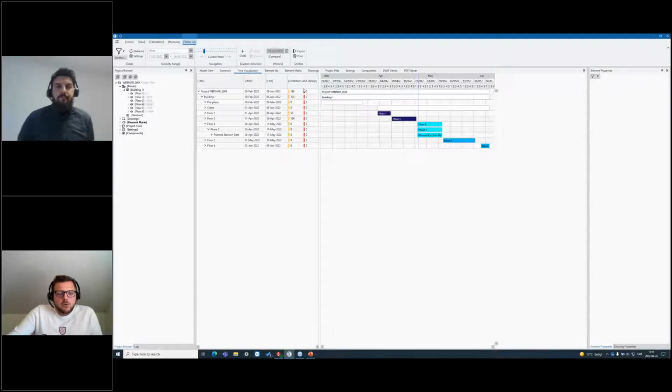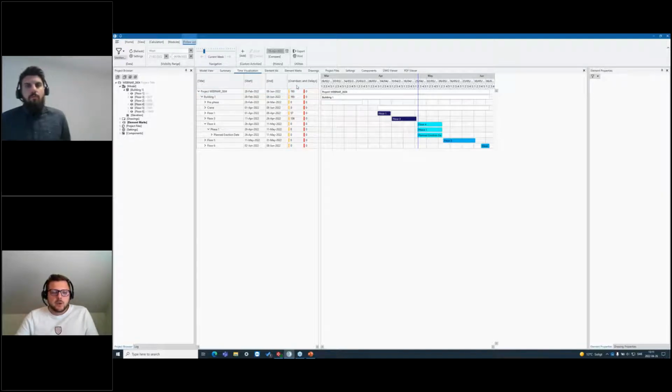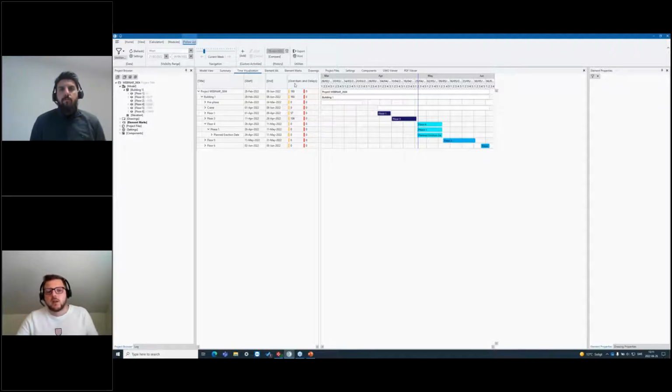Overdue is, let's say that you had a transport planned Friday last week, but in reality it was postponed for some reason. So it went to the site yesterday. Then it's an overdue because it's a delay, but it's nothing that we are waiting for. The element either was produced or was delivered anyways.